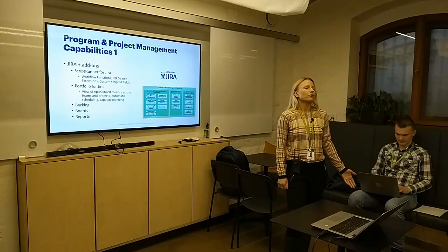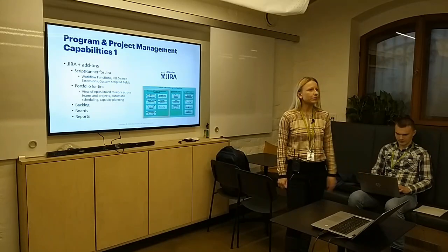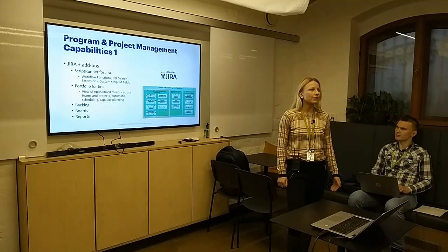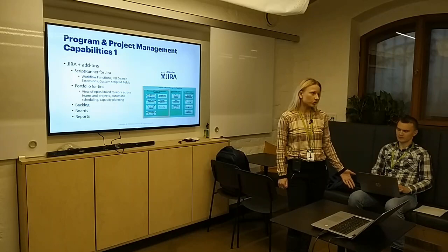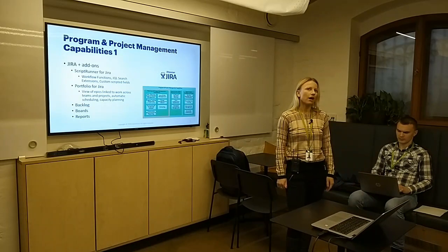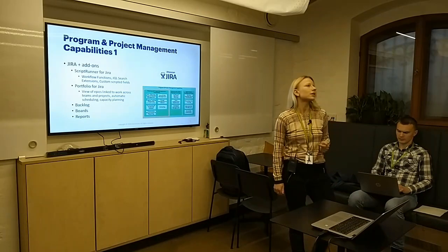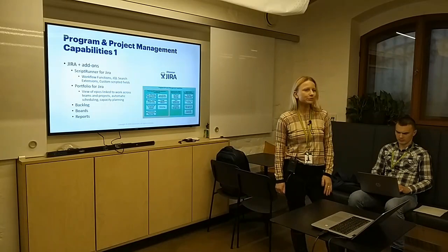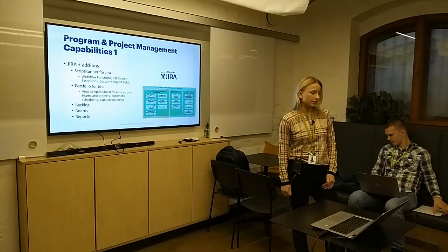We have sprints, 2 weeks each, and each small agile team has a planning meeting on the first day of each sprint. Together, all our teams have an increment planning meeting, once per 5 sprints, so once per increment. Jira is really useful in this case.